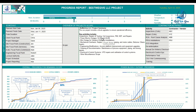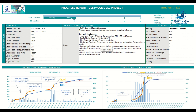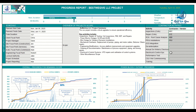You then fill in a brief scope of work — whether your project covers civil, mechanical, electrical, structural, equipment, commissioning, startup, outage, shutdown, or curtailment — so that the executive or upper management reading this can understand it. On the right-hand side, list your main activities and key contractors. For example, inspection by Company X, repairs by Company ABC. On the left you have key people and dates; on the right, key contractors; in the middle, the scope of work.